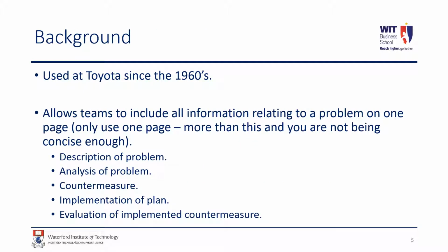So this concept originated in Toyota and it's been used at Toyota since the 1960s. Again, as we just said, it just uses one page, and on that one page you describe the problem, analyze the problem, suggest countermeasures, implement a plan of action that can be taken, and then you evaluate the outcomes of that plan.